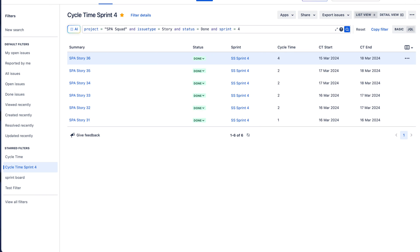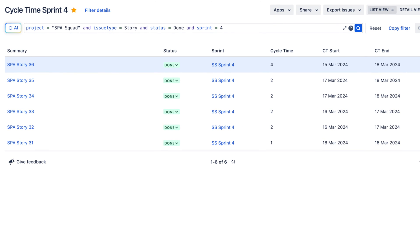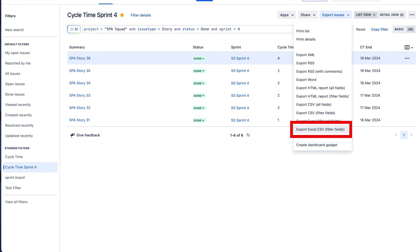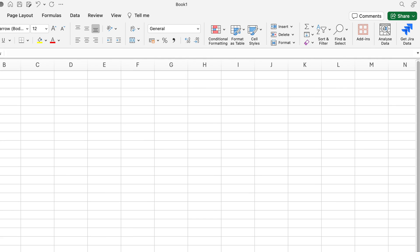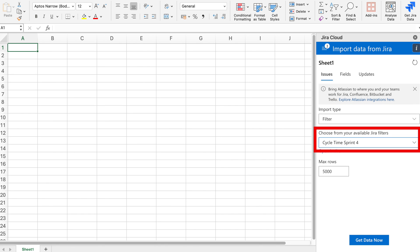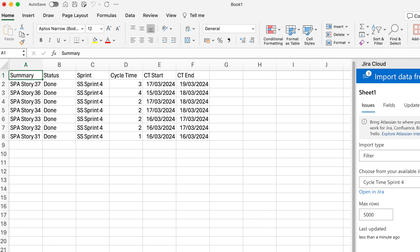Now click on Filters and then View All Issues, and we can write a very basic JQL to get the data we need. Click the JQL button. In my example I'm specifying my project where the issue type is Story, status is Done, and was in Sprint 4. And here are the results — click Export Issues. But there is a nice way around this which is a real time saver — you connect Excel to Jira. It does require a plugin, and although it's free it may not work for everyone for the same reasons you can't install Timing Status or EasyBI. But for me, I just open Excel, click Get Jira Data, select filters, choose my filter and click Get Data Now. Very cool — this is just a small list from my test Sprint 4, but yours will likely be much bigger depending on your Jira filter query. So now you can get your cycle time data for free natively within Jira.